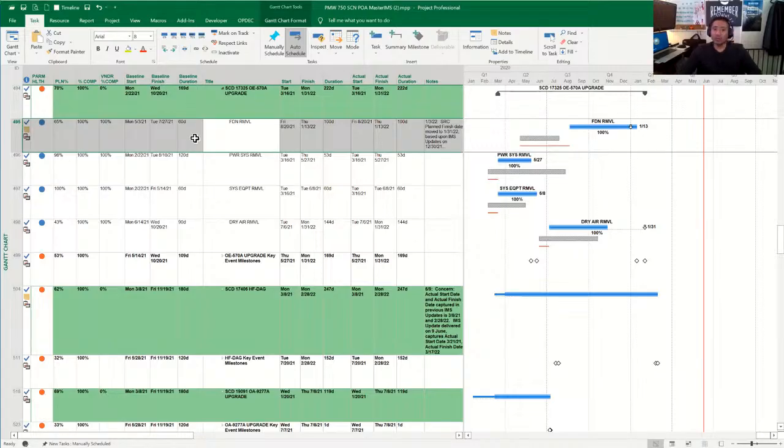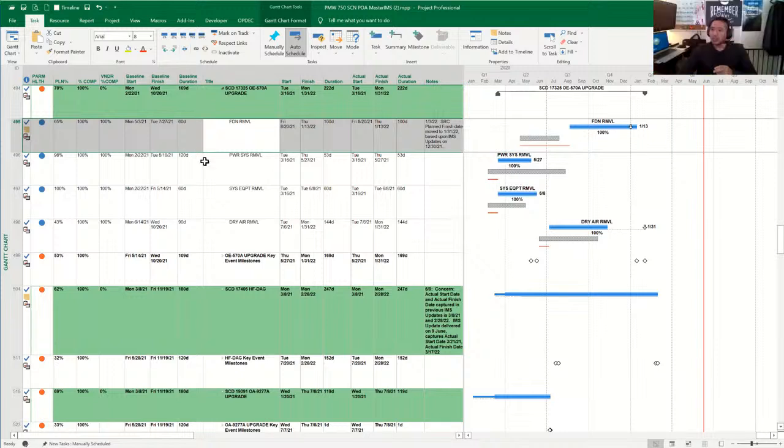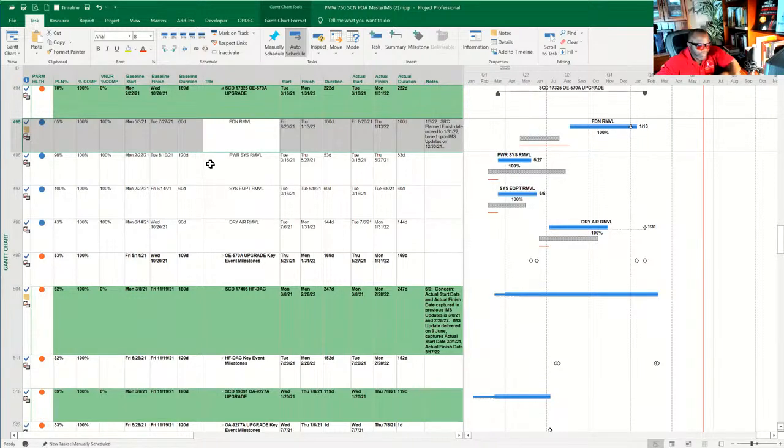And it doesn't affect your critical path, because it's just specifically like a marker, put it that way. Exactly. Versus using a must finish on or one of those. So if one uses constraints such as must finish on or must start on, even though it doesn't have to be that way, you're just going to create artificial constraints in the schedule.